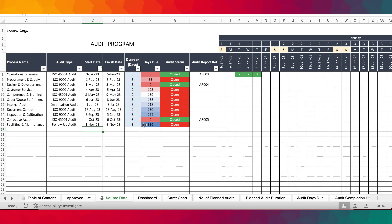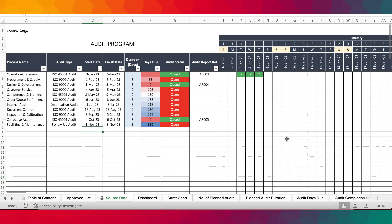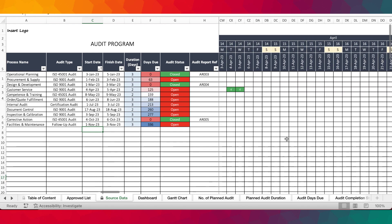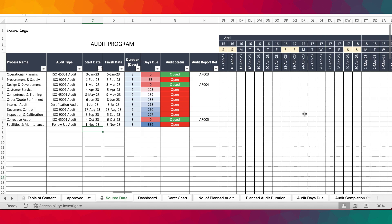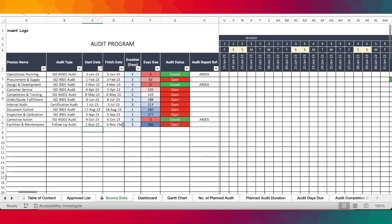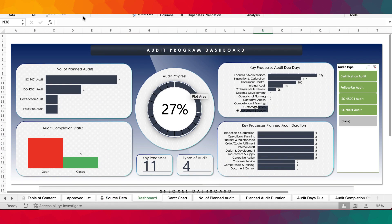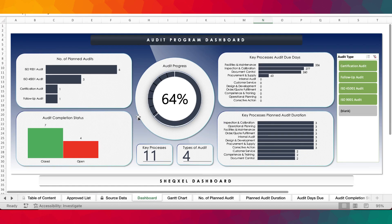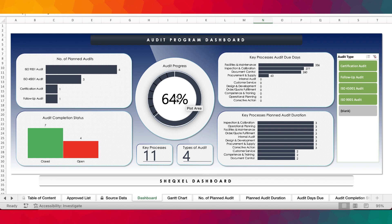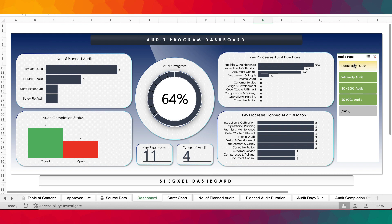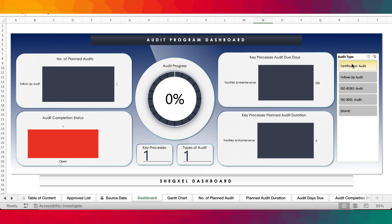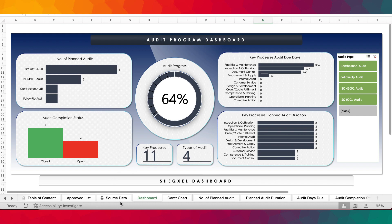The timelines have been updated to 2023. As you can see, everything now looks great on the calendar, showing the various days that audits are being carried out, and the duration has been set correctly. Let's assume that some of the audits have been closed out and we update them with their respective audit reports. We go to the data tab on the menu and click Refresh All. After refreshing, the percentage completion rate has increased to 64% and everything is updating accordingly. Basically, this template helps you see how you're progressing with your audit program.